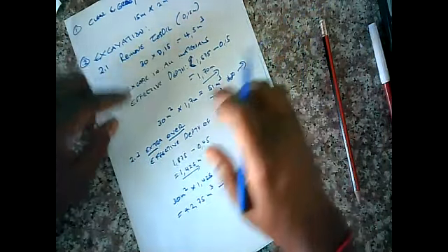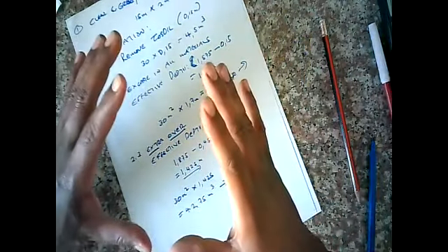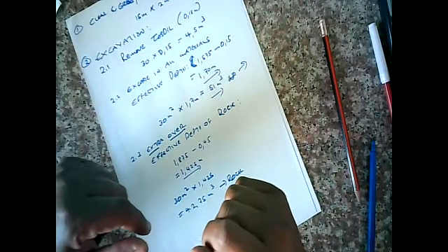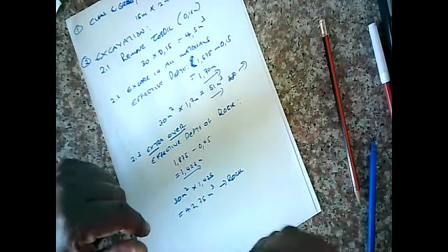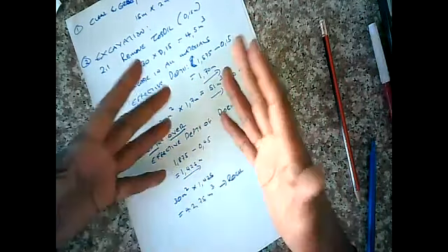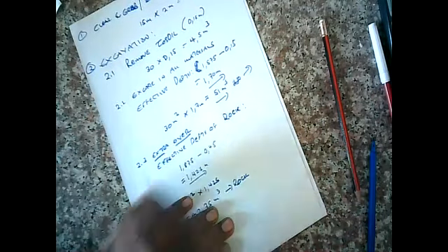All right? So this is the concept of extra over. It's getting paid for harder work. And you should. Anybody should. Because the machine is working harder, more fuel, more time, more money. Now, that is the concept of extra over.